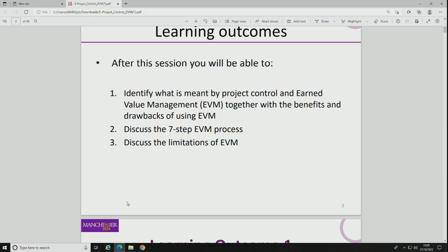So we talked about work packages and then going from there to a network diagram. We've got these activities. We can assume work packages and activities are the same for simplicity. I remember we had this organizational breakdown structure. Do you remember we matched the work packages to the organization? So we had this kind of matrix: the work packages and the parts of the organization. We linked responsible people to work packages, so they're responsible for the budget of that work package, which is essentially an activity with a duration and resource profile.